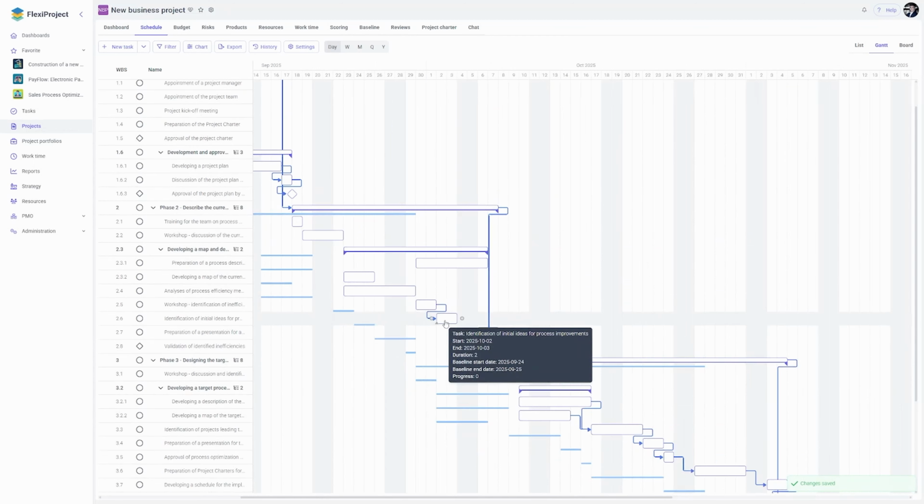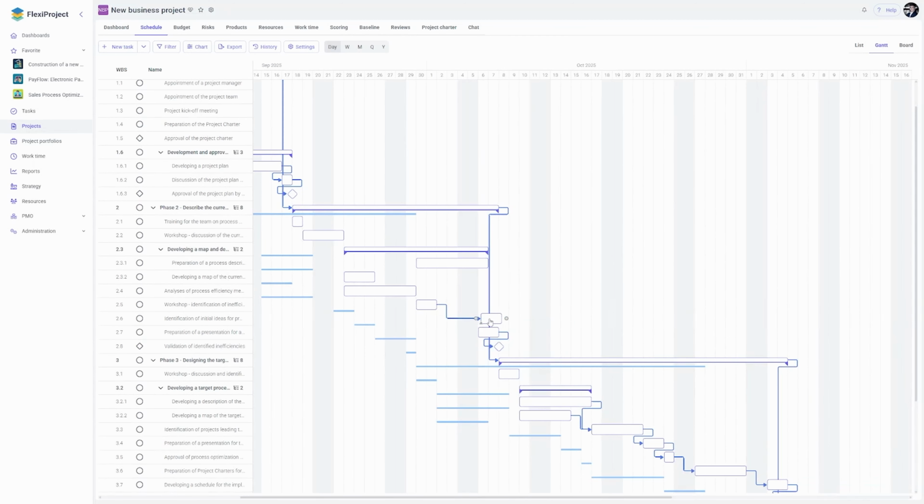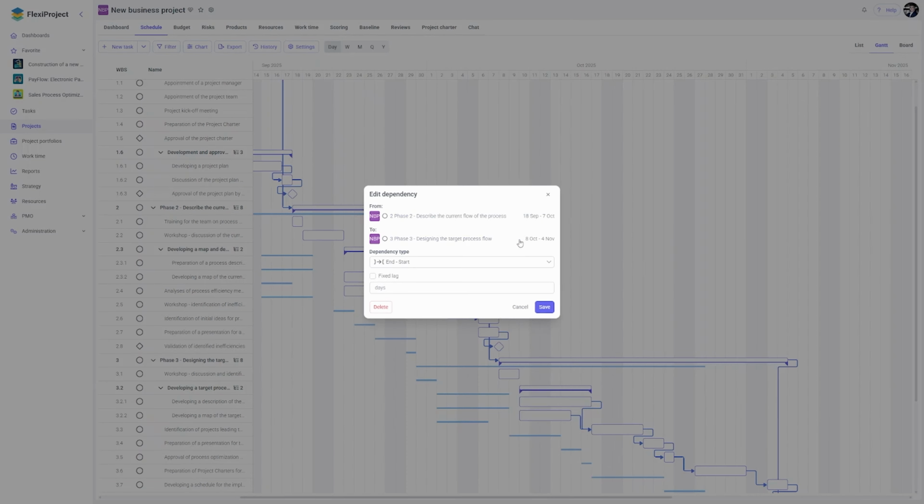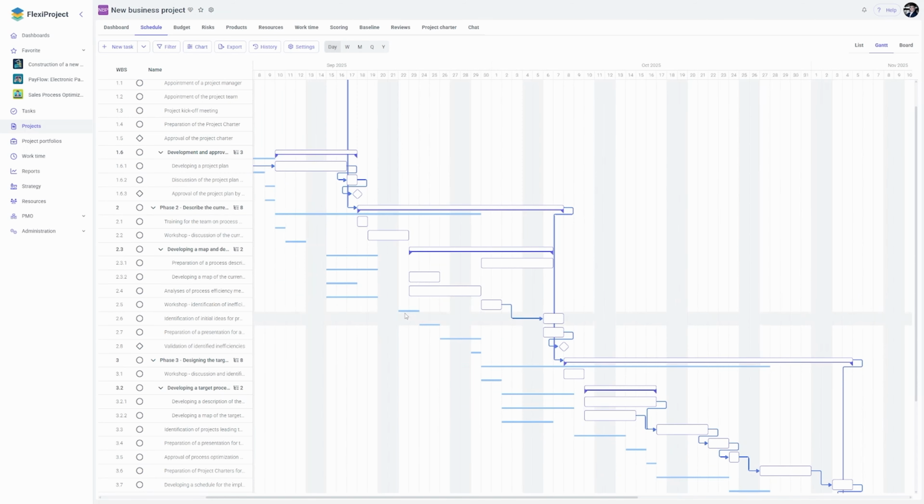The first is that my dependent tasks have been delayed. I talk about dependencies in another video, and I encourage you to watch it. What we can see here is that when some tasks are shifted, the position of the task tiles on the schedule also changes. The schedule changes with respect to rectangular highlights, which indicate my baseline. The location of these bars, which show me my basic plan, has changed.